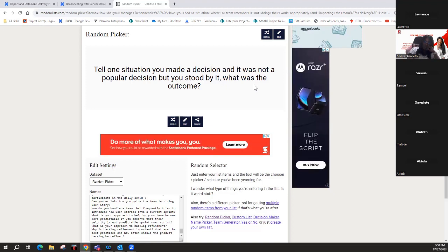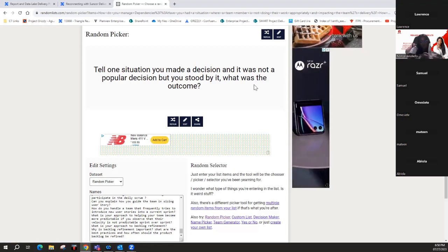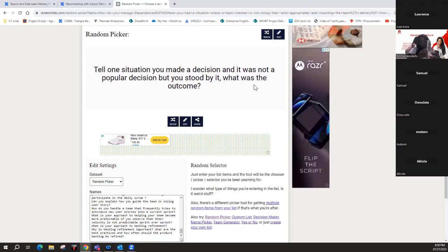So if we get anything like 1 or 2 when they finish voting, the average is 1 or 2. In fact, even if we get one person that votes 1, even if everybody else was 4.5, we need to find out why someone is voting their confidence to deliver the work as 1. That means there's a misalignment. They're not confident that they can do the work. Why? Then we problem solve.